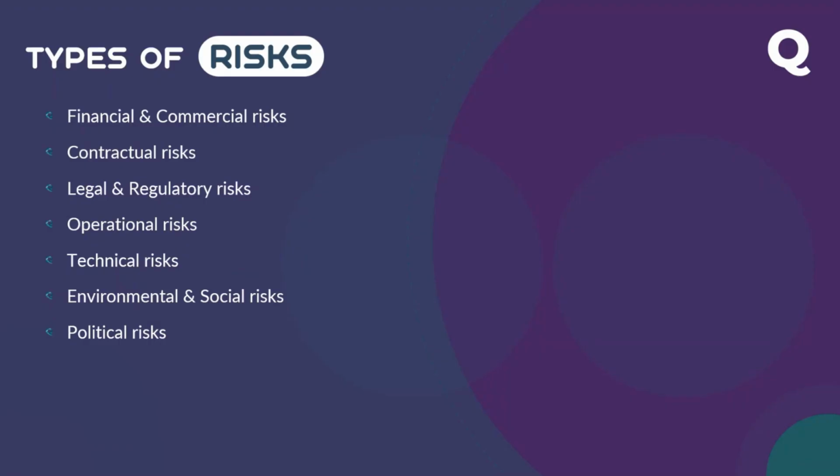So make sure, guys, that the implementation of any law, statutory decision, or decree is a risk for you if it's not addressed. So when you go through the documents and you find there is nothing drafted in the contract against a potential new law implementation, you have to ensure that it is covered under the contract. I'm sure if you are aware of the FIDIC form of contract, when a new law is implemented, it's cost and time as per FIDIC.